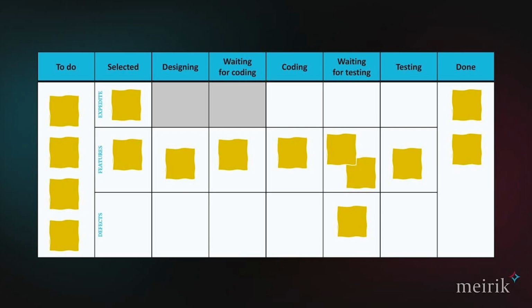A few very important parts of the Kanban board, Kanban system would be limit of work in progress for the columns, as you can see here in the corners, as well as two important points. These are lines, frankly speaking: commitment point and delivery point. The lead time, in our schools known as cycle time, is the elapsed time for a card between the commitment point and delivery point. And there are extra rules around it that I'm not going to cover.